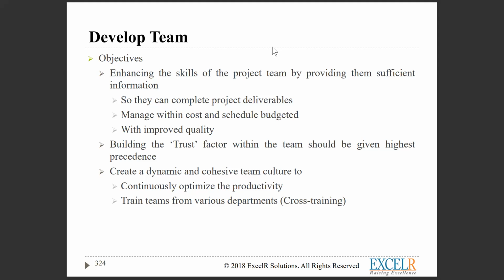You have to ask the resource who is working on the critical work to document each and every thing, record it, so that you can pass it on to the next resource in case something goes wrong. That is called cross training.